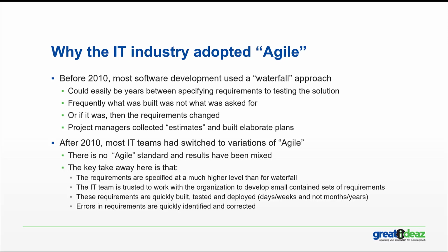So if you basically fail to specify how a customer works correctly, then great, we implement the customer, we have a look at it, oh, it's not quite right, let's fix it. Right? Waterfall solution, you might have got that wrong, and it might be 2 years later when you actually find out that you made that mistake in the customer definition. So with Agile, the idea is, put it in place, try it out, does it work? If it doesn't work, what do you need to do to fix it? And that you do that over a short time frame, working very collaboratively, right the way from the business through to the implementation and operations team to make sure that everything is actually being specified correctly and that you have a good balance of correct requirements being delivered to IT in a sequence that makes sense to the business to deliver value to operations.